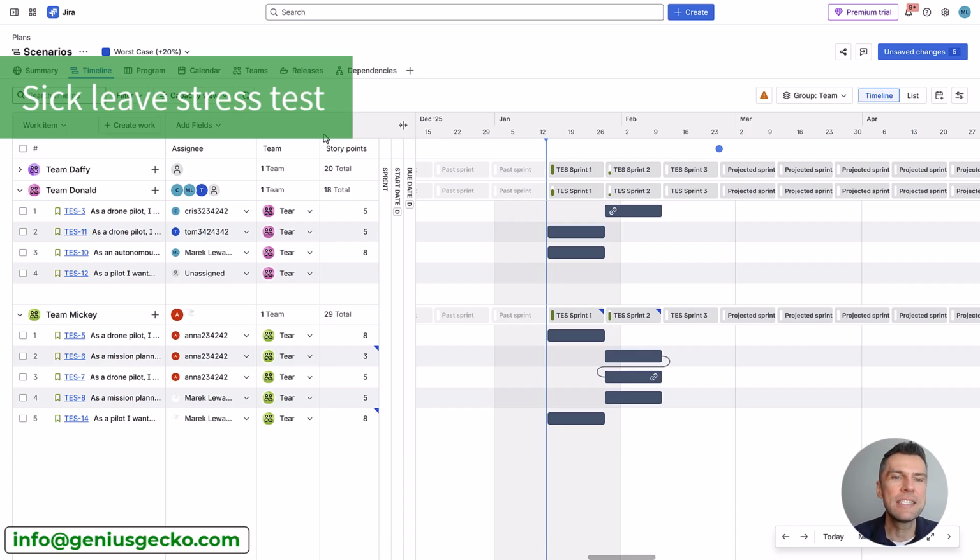But imagine that in our case Anna falls sick. What happens in that case? Typically teams will simply move the tasks and show a delay. But that might not be the actual problem. If we unassign Anna from the tasks, or where Anna's capacity falls to 0, tasks can pile in an unassigned bucket because no one else has the same skill as Anna.